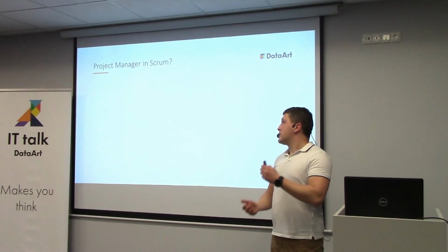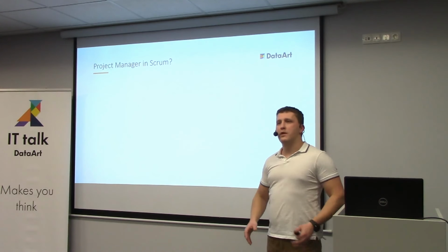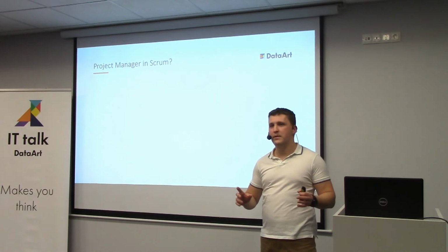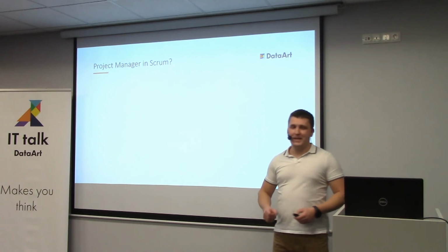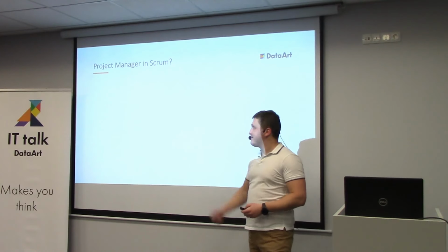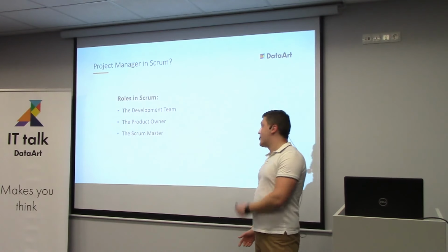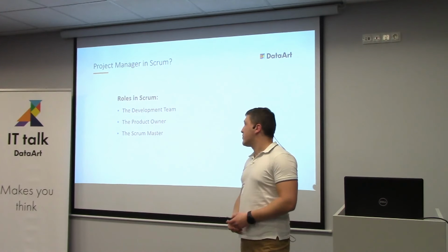Now, to finish, once again, I will ask you to raise your hands. How many of you are familiar with Scrum? Well, great. Then obviously you should know that project manager is Scrum. No, Scrum doesn't recognize that role. There are only 3 roles: the development team, the product owner, and the Scrum master.